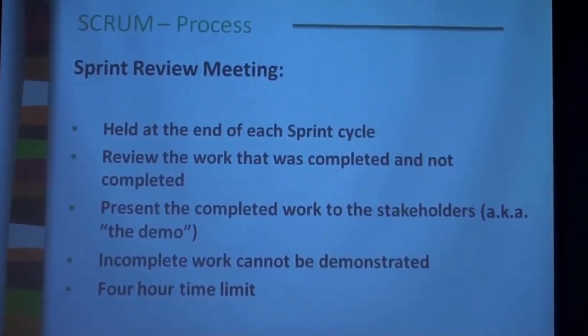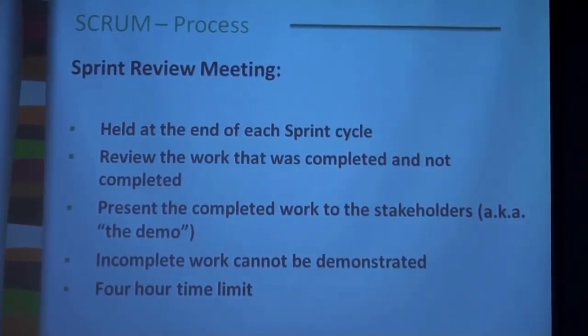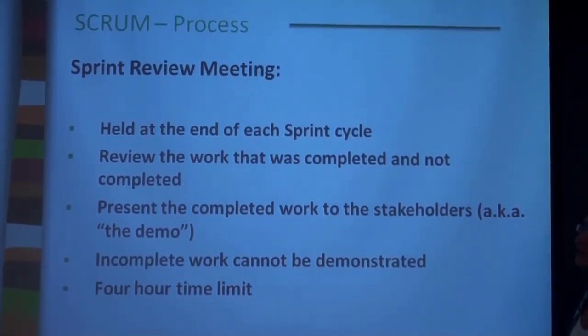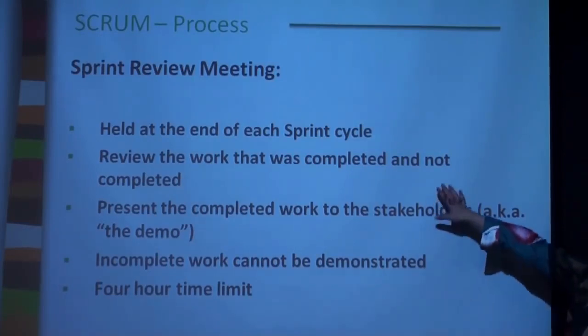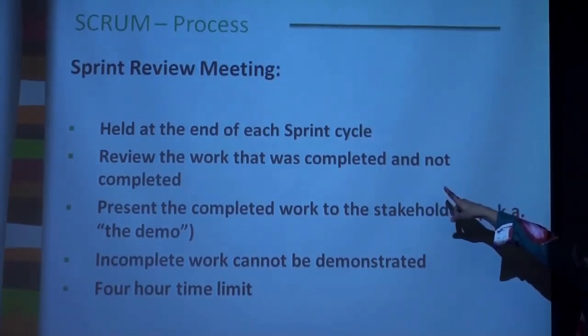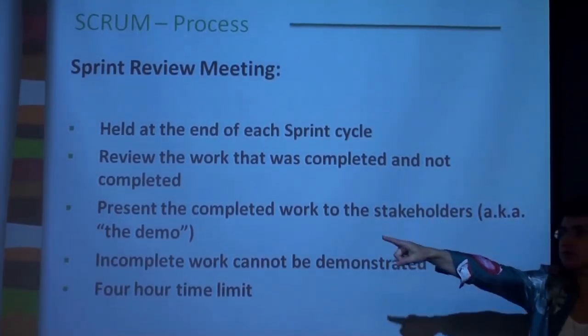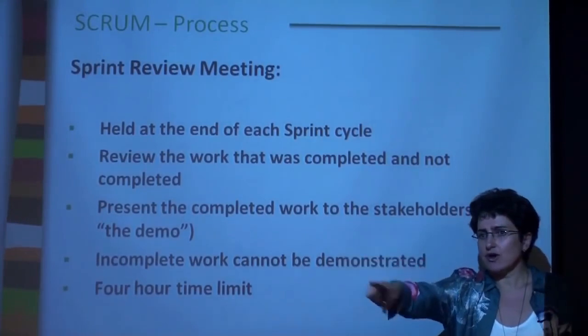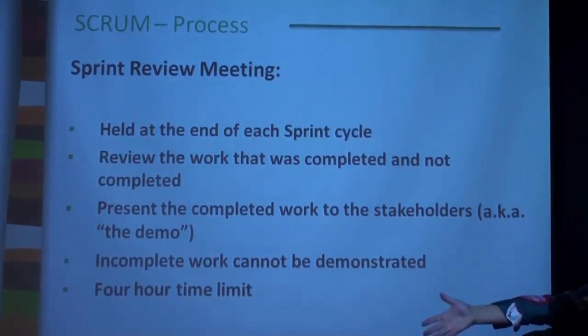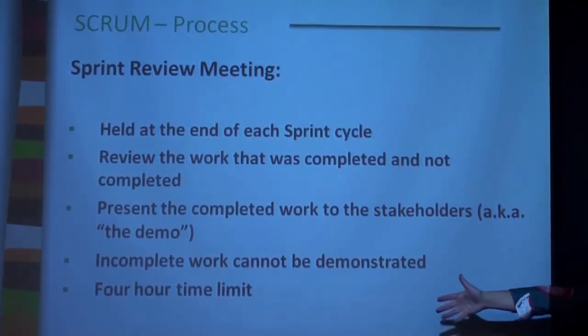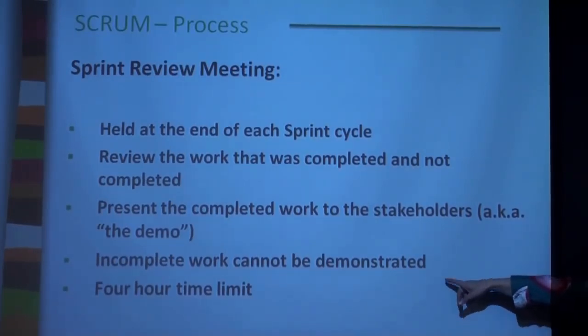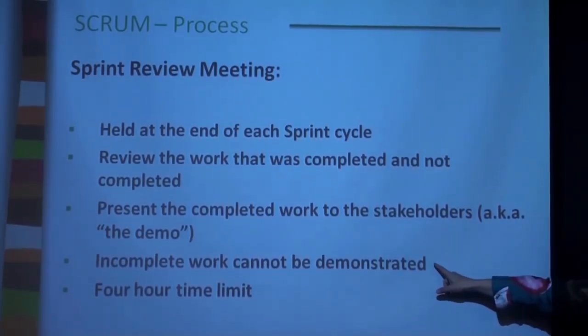Once the sprint is done, right, once all the work is done, all the development and testing for the features that we wanted to develop is done, we should have a review meeting. So what is done on that review meeting? We review the work that was completed and we present the completed work, and this is what the demo is about, right? So you have to demo the features to yourself to see whether you achieved your goals for the sprint, and this is very important, incomplete work cannot be demonstrated.